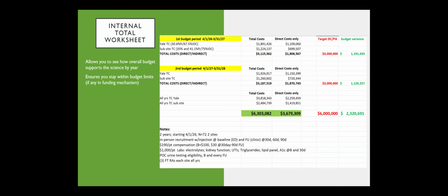Yeah, it does. It's good to know that you're not locked in and that you can't move a single dollar. No, you can move within this group. Let me explain that, and Patty will tell you. You can move anything within the groups. So say, for example, in that other costs category, I have a whole bunch for incentives, and then I have a bunch for publications, and I have a bunch for travel. You can move that. You can change that. They don't really care. That's other costs.